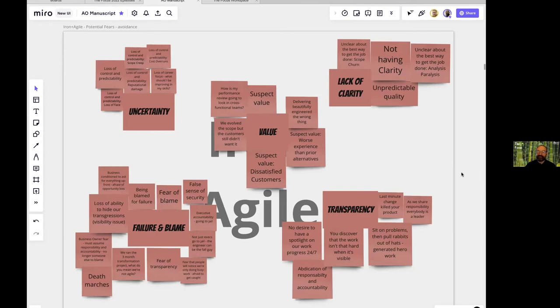And that, you know, the saying of nine women cannot make a baby in a month comes to mind. So these are all signs of a death march. That's right. Fred Brooks has a classic book of essays called The Mythical Man-Month. And one of his sayings there is throwing manpower at a late project is only going to make it later. But I think that book must be at least 50 years old, and it's still as topical today as it ever was.